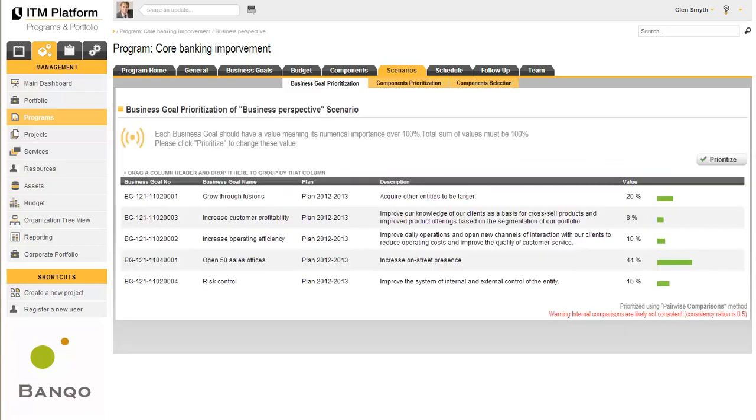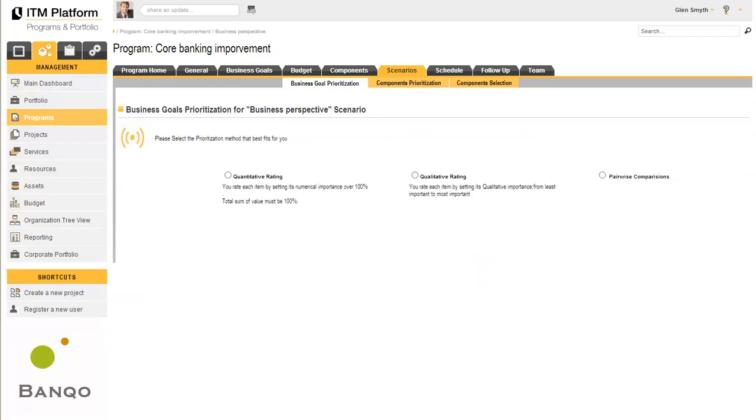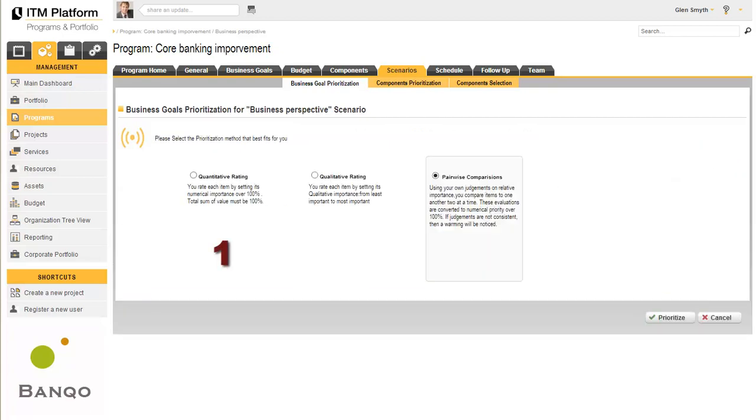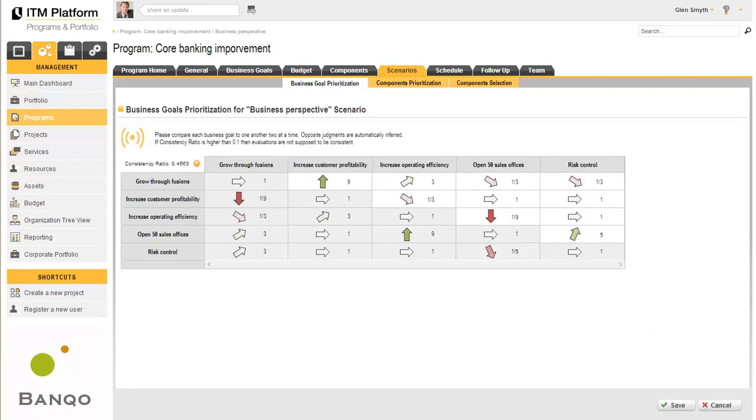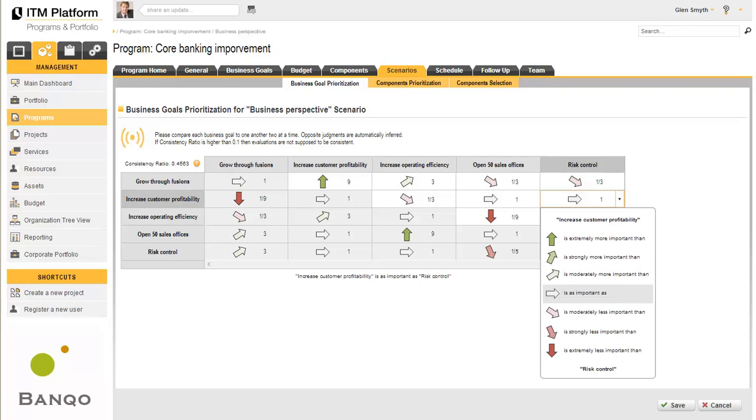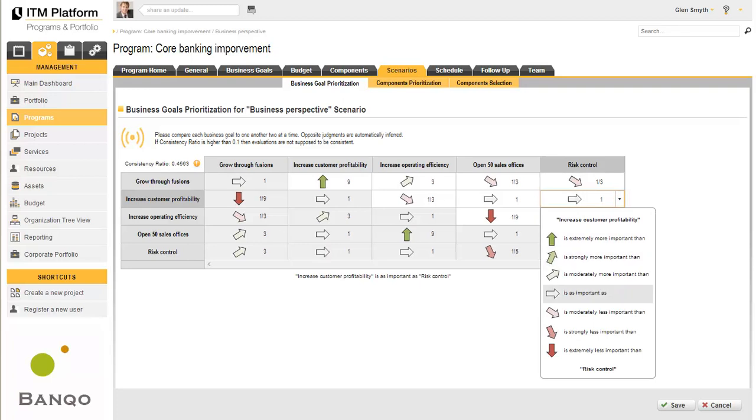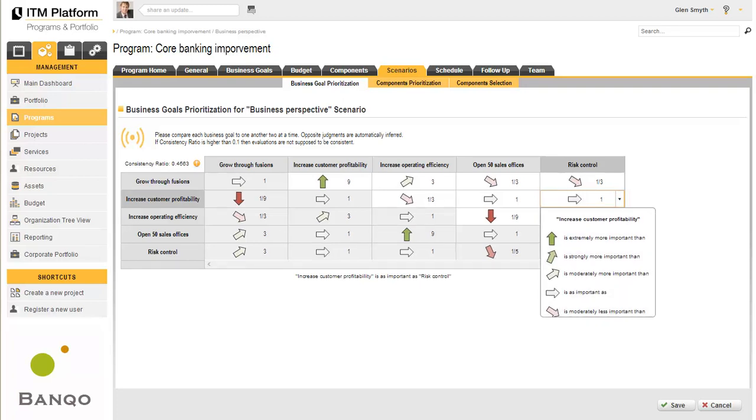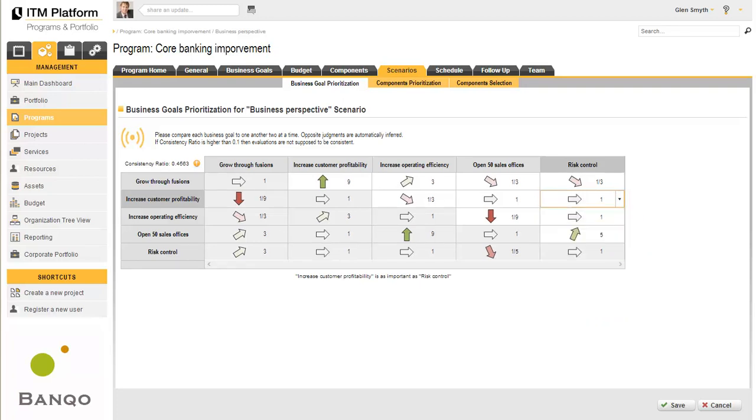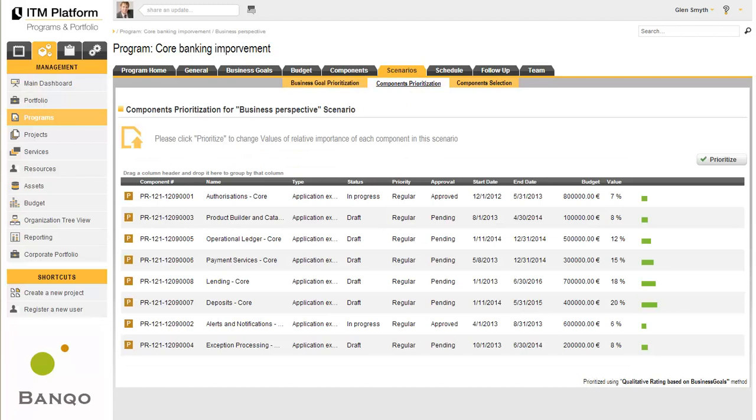To create a scenario, you'll essentially need to prioritize the objectives using the various methods offered by ITM Platform. In this case, we have chosen to perform a pairwise comparison to determine whether one objective is more or less important than another. With this map, ITM Platform will generate a series of percentages for each one of the objectives.